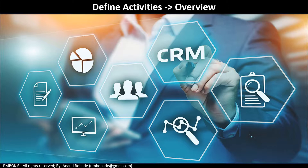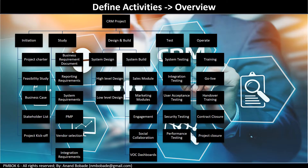It involves a lot of integration. The scope of the project is already baselined, and now we want to create a schedule. Since the project has an approved baseline, you already have a work breakdown structure. Take the work packages and identify the activities needed to produce each of them. It is very important to differentiate between work packages and activities. Work packages are nouns because they represent what is to be accomplished — for example, training, building a module, completing performance tests. Activities are verbs because they represent how those work packages will be produced.